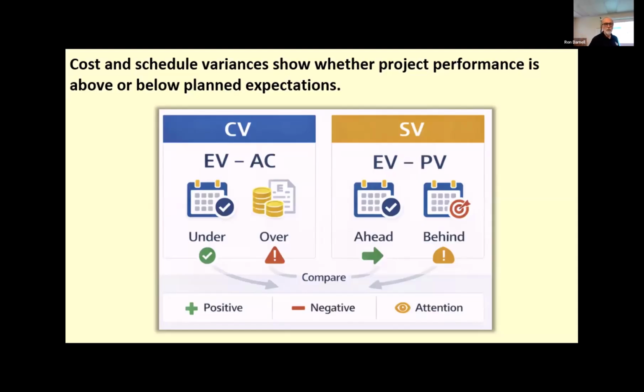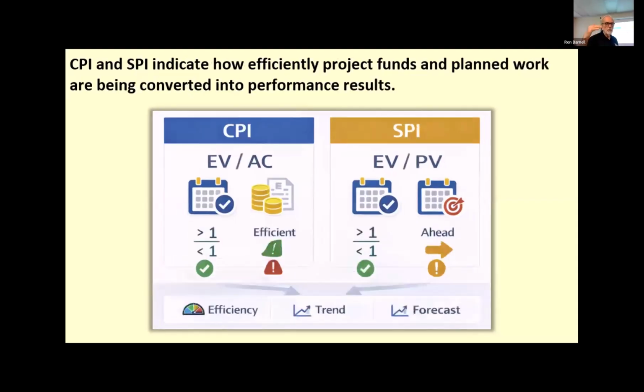And so the formula for that is schedule variance equals earned value minus planned value. And again, so far, it's just arithmetic. At this point, there's no algebra and no calculus in here. There is a field of study, econometrics, that covers some of this kind of thing, but it's way beyond this. It's essentially a statistics course, and we don't cover that in this class. It's out of scope, but it does apply.